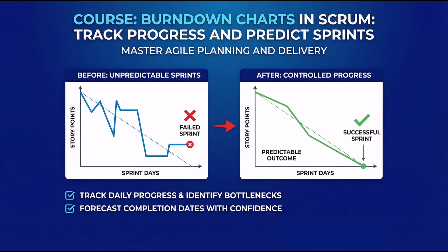Diagnostic. We asked the questions and discovered two issues. 1. Tasks were too large, most were 3 to 5 day efforts, and 2. The team culture discouraged updating incomplete work.